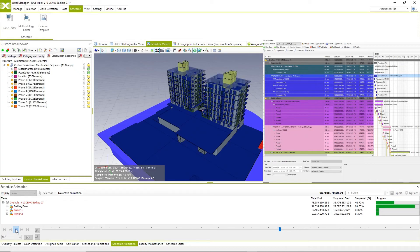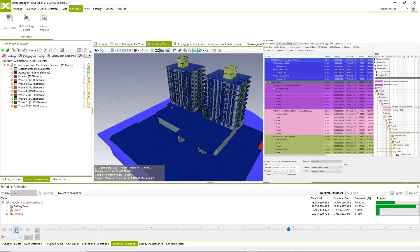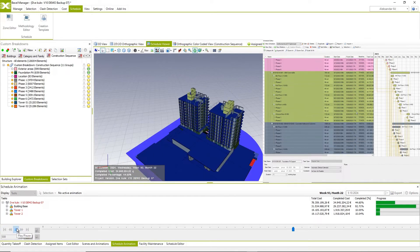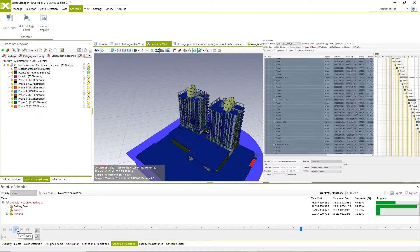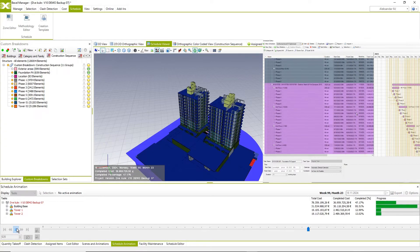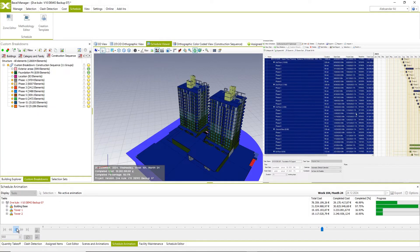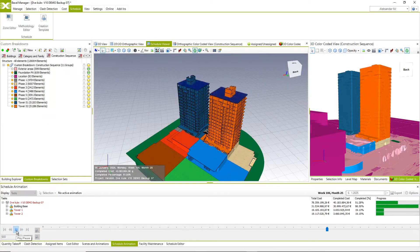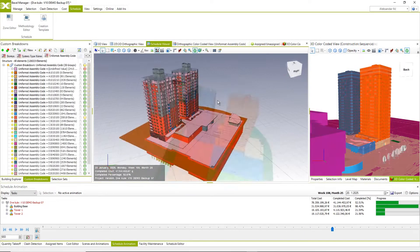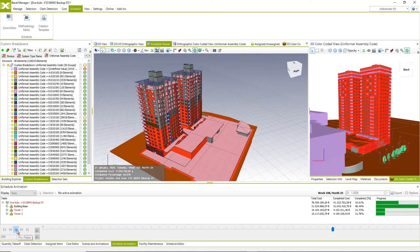Play 4D or 5D simulation and visually verify construction schedule. Colorize BIM element by actual task colors or color coded rules.